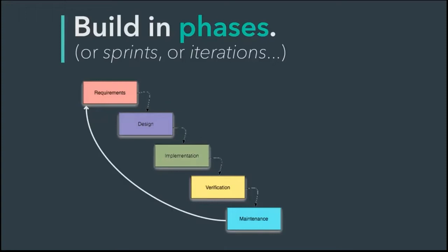Now, there's nothing really wrong with these 5 steps, but as we saw in previous slides, if it takes months or sometimes a year or more to complete one round of this cycle, then you're going to run into problems in R&D. So what we wanted to do when we were building our R&D work cell was to still go through these 5 steps, but shorten this cycle from months to the span of weeks. And for us, this meant developing small chunks at a time, continuously deploying these chunks in lab, and constantly working closely with our scientists to figure out the next cycle.